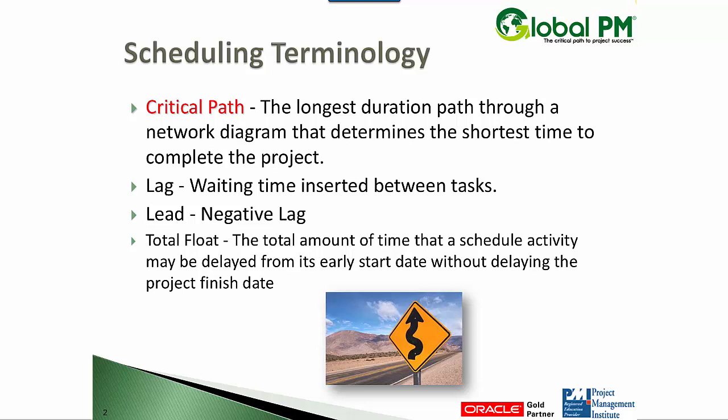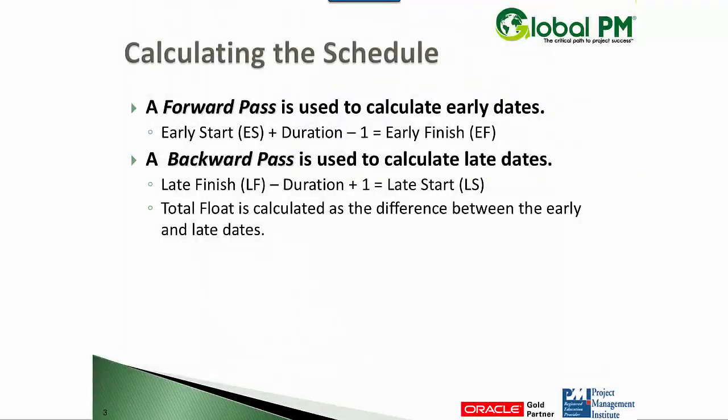Float. Float is the amount of time an activity can slip before delaying the project's finish date. So typically that's associated with total float. Free float, on the other hand, is slightly different. It's the amount of time an activity can slip before hitting its immediate successor. Normally, if somebody says how much float do we have on activity A1030, they're referring to the total float.